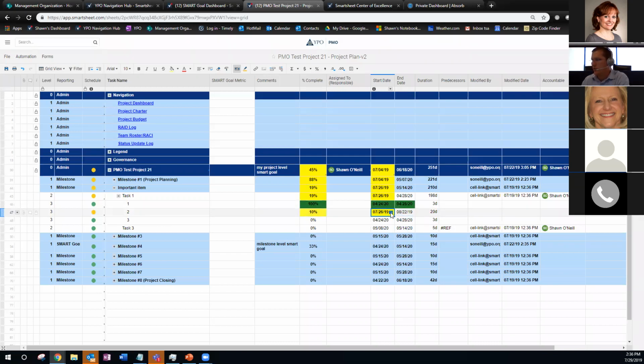Now, as you're working along in the project, if the end date starts to approach, say it's the 16th, a little closer, it will turn yellow. It's now within 2 weeks. Just FYI, your end date is approaching, and you can set up automation to notify people if you wanted, but it's just for your eyes to catch so you know that it's approaching.